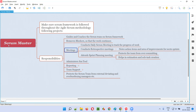Coming to meetings, the Scrum Master administers the Jira tool every day. This means checking whether stories are being pulled properly by developers and testers during the sprint, whether proper comments are being added, and whether the team is performing the respective actions at the proper time. If the team doesn't follow the process, the Scrum Master will guide and coach the team to follow the correct direction.